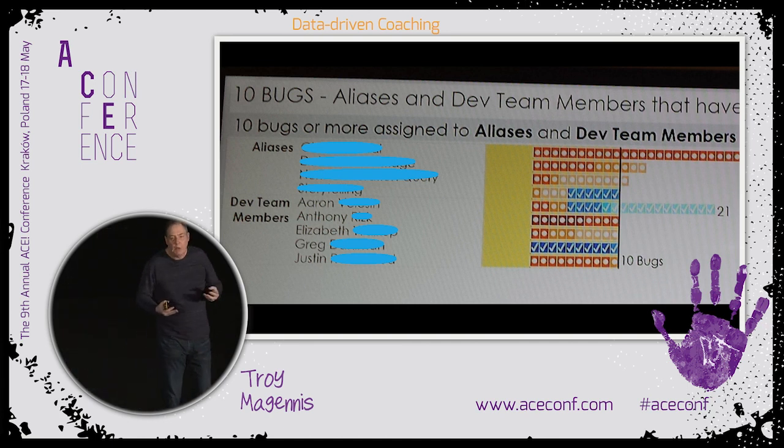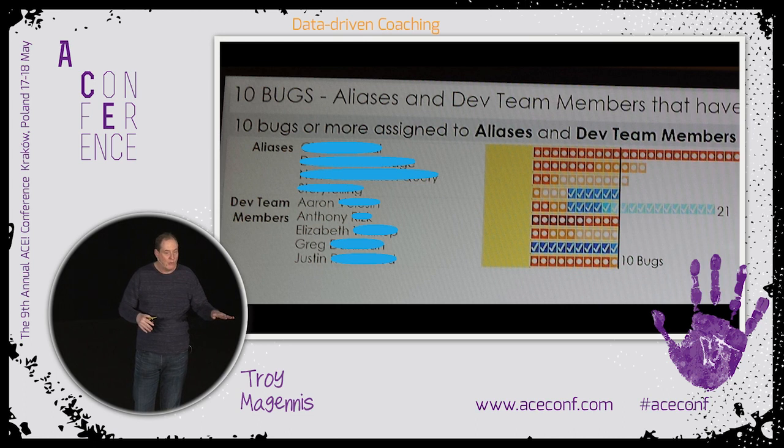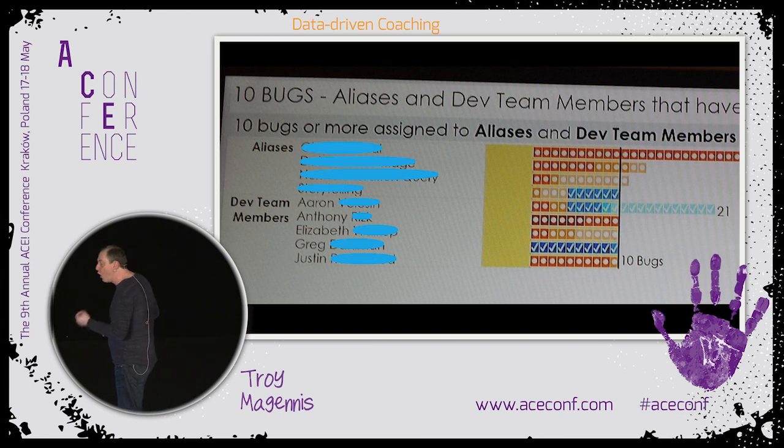So the problem now is there was no real data to forecast when this project was going to finish because there was an unknown number of defects still in the code. So it is just bad practice. It is bad practice to put individuals against this data, and you're just going to send data underground. You're going to lose perspective about where you are. So there's a good business reason not to give people a reason to hide data.